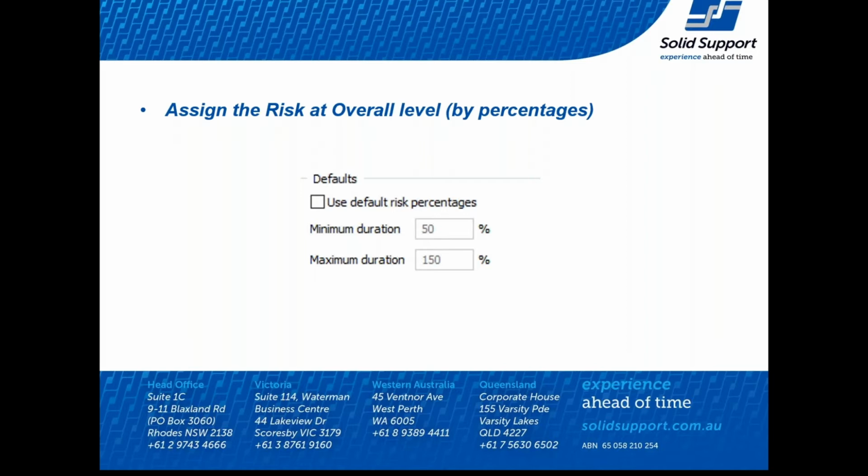You could import a Microsoft Project file and run your risk analysis without having to assign the individual minimum and maximum durations. So you can take a file from another system and bring it in and run risk analysis. So even if you're not planning in Powerproject, you could use this as a risk analysis tool.